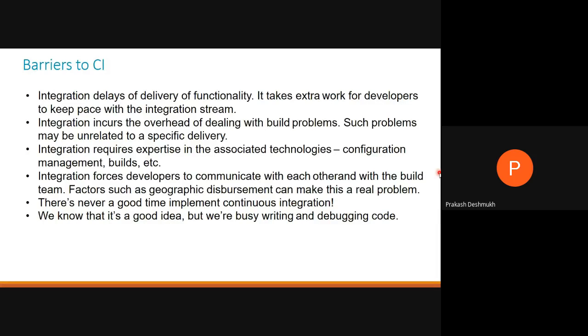When the build is failing or merging is failing, and that change is made by somebody sitting on-site in a different time zone, you'll have to wait till that person is available, and that sort of collaboration takes time. Such challenges can be found, and they need to be addressed by making the team have some overlap in a good way.